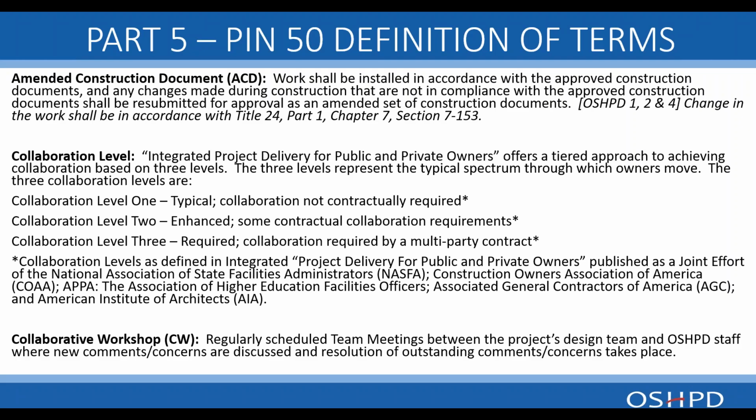Just a point, collaborative workshops is not the place where a back check is done. Back checks are done once the review is complete and the plans have been revised and resubmitted, but a collaborative workshop does allow for discussion of resolution to comments.